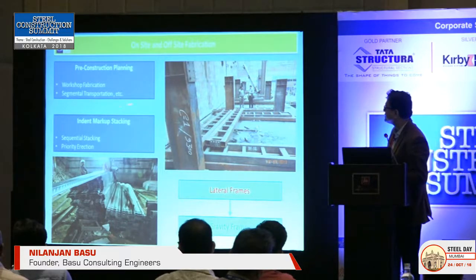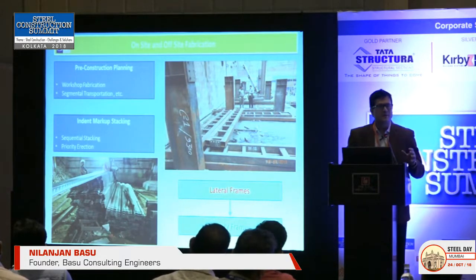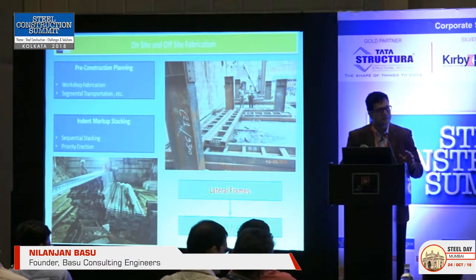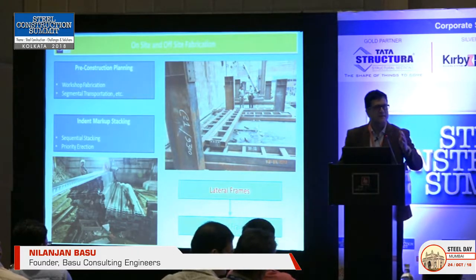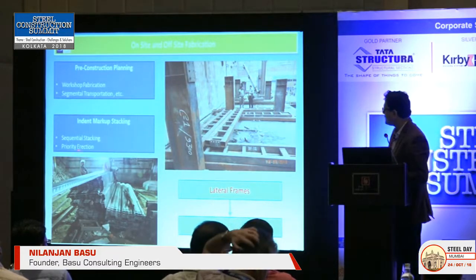Then we have a segmental transportation planning. That is a phase-wise transportation planning, because at site, it's not always possible to store all the material which comes. So we plan with the contractor where and how much material, in which phase of time, he is going to store, and which frames he will be erecting.